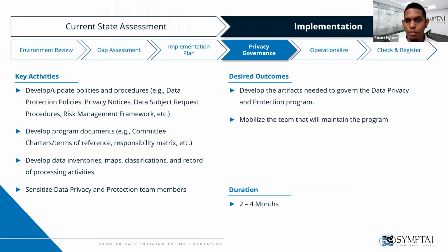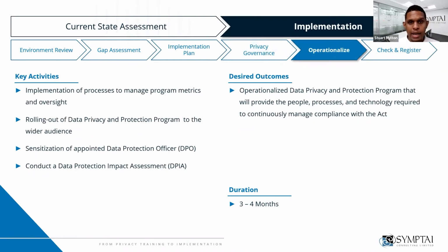I can tell you for sure, procedures take a while to develop because this actually requires meeting with the persons who are doing this on a day-to-day basis and creating enough steps that they can clearly walk away and do this same process again without any other intervention. So we have to be clear about the steps included in procedures, and that may take a couple of weeks to really refine. Again, while we're still on implementation, of course, is operationalization.